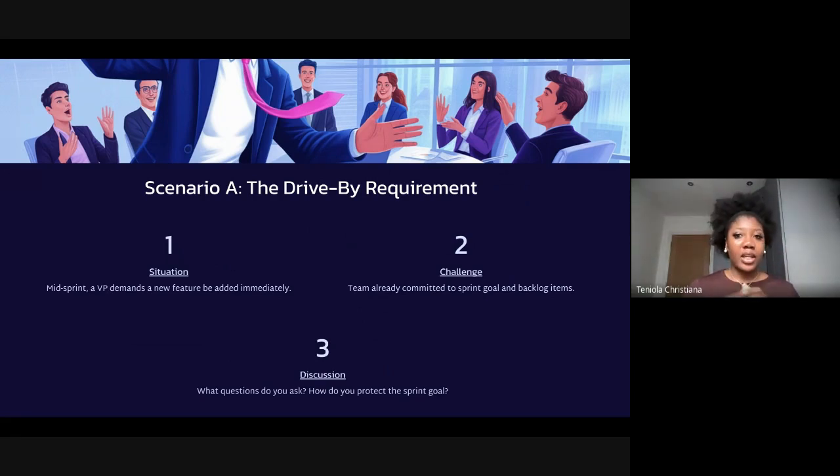Even if you have a feature that should ideally be top priority over what is currently in the sprint, when you are already underway, causing disruption because of a feature that is so important really isn't worth it more often than not. It can be something that you add, it can be something that you do immediately next in the next sprint. But again, even if the data says this is really important, there still has to be a very, very compelling reason to disrupt the sprint based on that. So those are the two things that I would say.